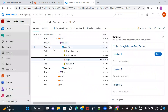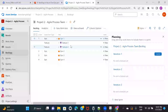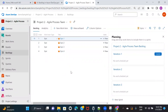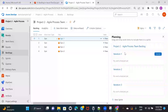This is how you create a backlog — four epics, features, user stories, tasks, and defects. Now, your backlog is prepared but the main work is still pending: you have to assign requirements from your backlog to iterations. After discussing with your team, manager, and scrum master, you decide which user stories go into Sprint 1 and which go into Sprint 2. You can simply drag and drop user stories to the respective sprint.